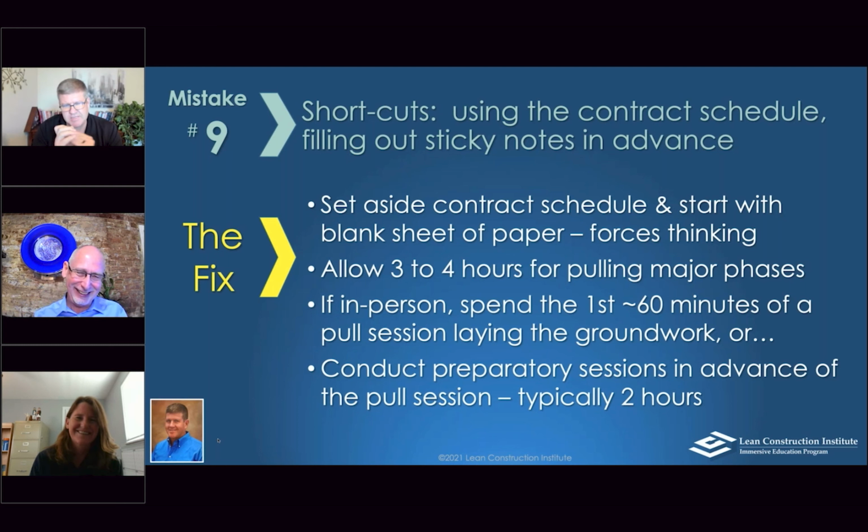Some people like to shortcut sometimes and fill out sticky notes in advance. That can be done if you've done a prep session in advance, and if everything's very clear on what you're actually tackling. Like Julie said, what is the milestone, what's included, what's not. Those are all very important things.